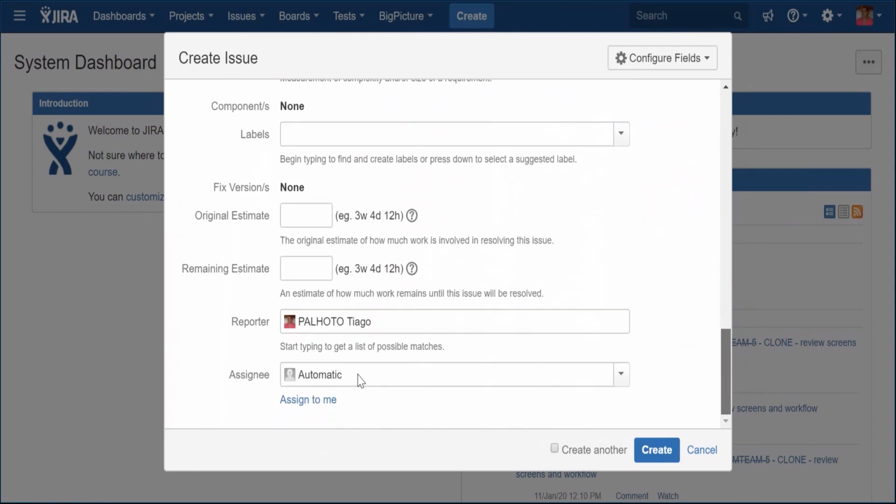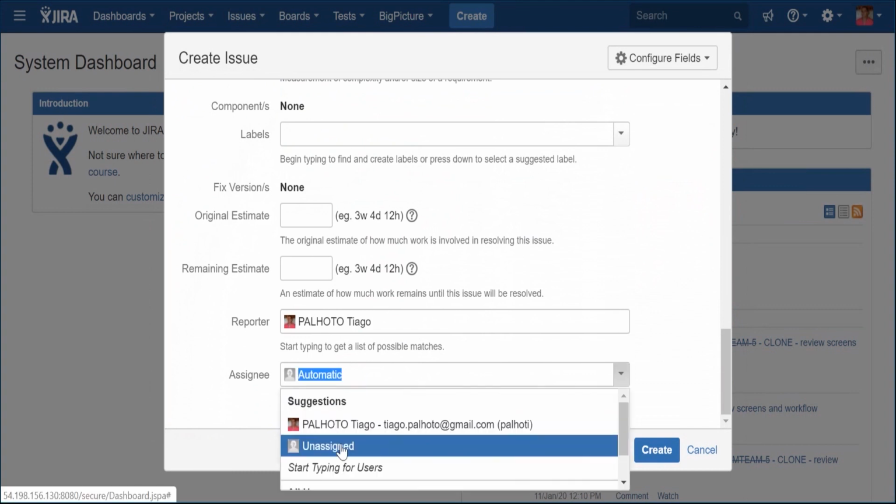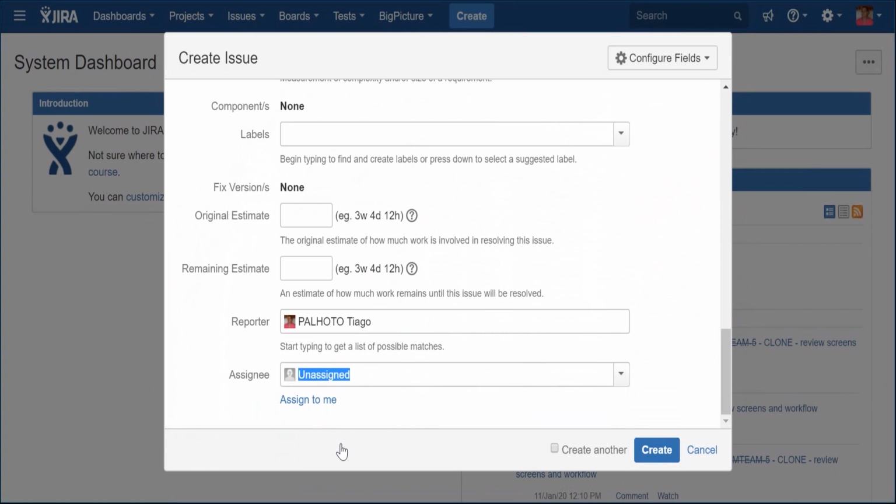The next attribute is the assignee. I often see this attribute filled with a specific name, like the person responsible to implement the story. After all, that's what the field actually means. Although you can use it in that way, I tend to leave it out since it's the entire team that is responsible to deliver the story and not one person. Of course, if you have a solid multidisciplinary team where each person can indeed go the whole nine yards on a story, then the assignee can indeed be a good option.